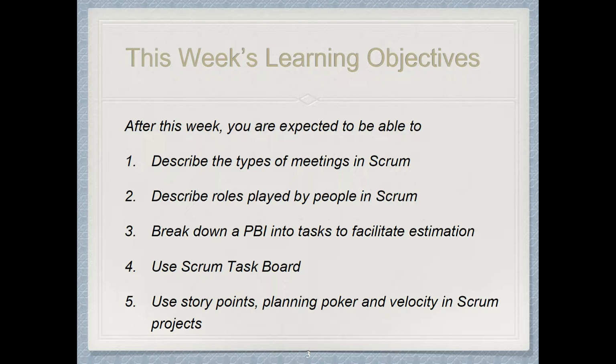So when we select something for the current sprint, we can get a good estimate of how much time it will take, and whether we should have it in the current sprint. We'll use some board, like a corkboard or whiteboard, to help us keep track of the project progress, and we'll learn a few things that also help us manage Scrum projects.